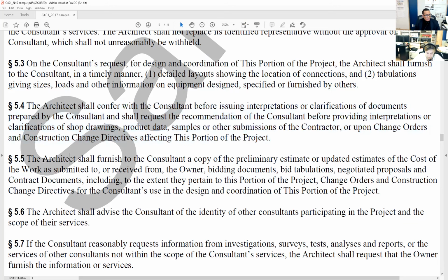So that's that. And you've got to involve those parties prior to issuing, because if the change order gets priced by the contractor, you can see it and say, oh no, wait a minute, there's more things that need to change. You're only changing the vanity, but you also need to change the pipe. The plumbing engineer just informed us that the pipe has got to change and it's going to be costing more. So all of that stuff's got to be said in there.